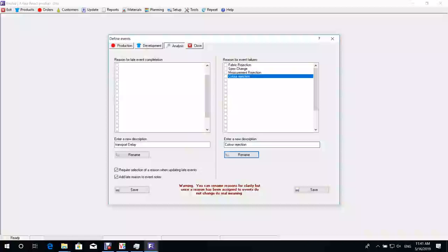It happens sometimes that one activity hasn't happened yet, and then it makes the next activity late because the previous one hasn't happened. That could be another reason. So the previous event is late, another reason. That's one general reason that we normally use in the reports. It's flexible to the next.